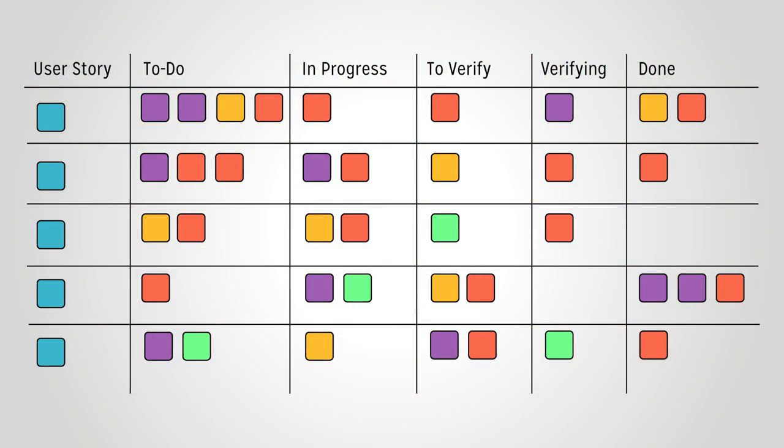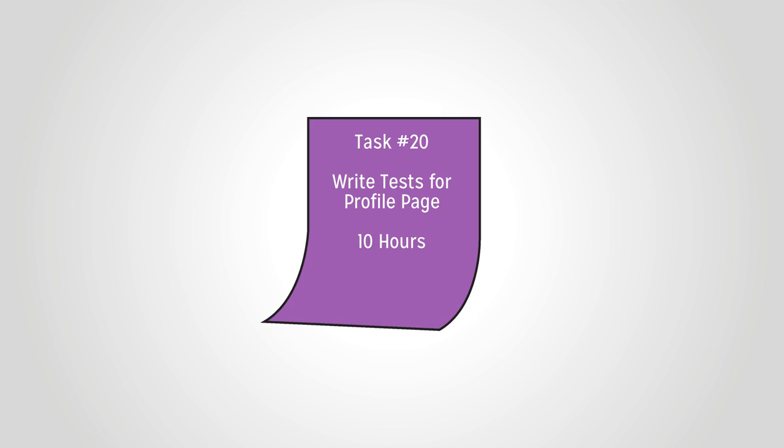In a Scrum task board, you have all user stories that you intend to complete for a sprint in the first column. You then break down each user story into developer tasks and create estimates for those tasks. By creating tasks for each user story, you are ensuring that no tasks are overlooked or missed. As tasks are in progress, waiting on verification, or done, they move across the task board, similar to a Kanban board. You can have developers write their name on a task as they assign it to themselves. This will help track who to talk to if you have questions about a certain task.